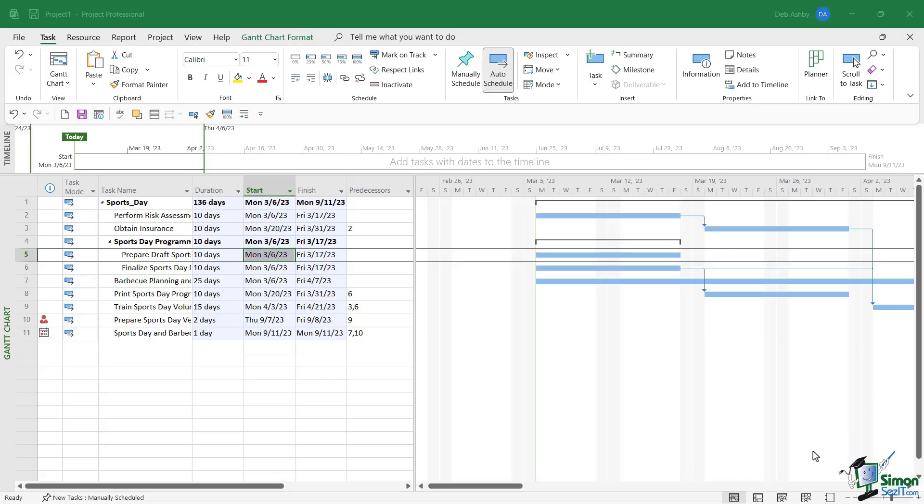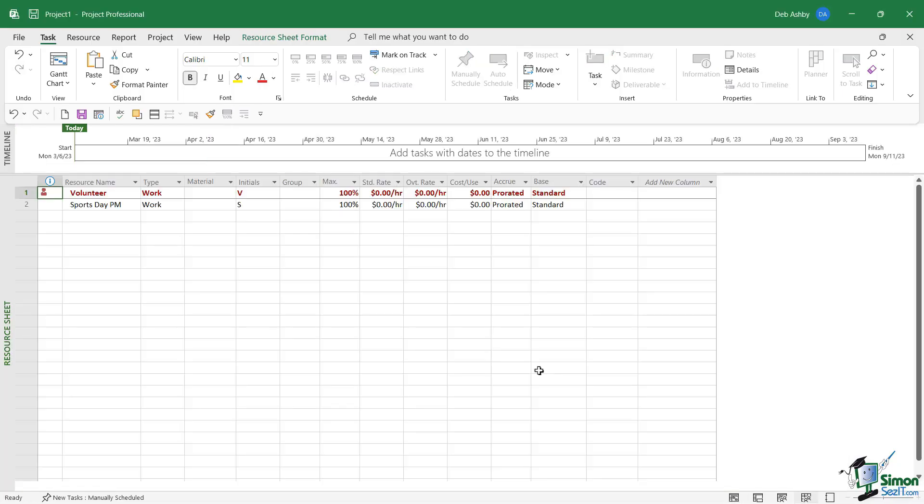Also, if we jump across to the resource sheet for this file, notice that we now only have two resources because it's only bringing across the resources that are included in this part of the project plan. And you can see that the volunteer is now showing as overallocated because we've split this section out. Now